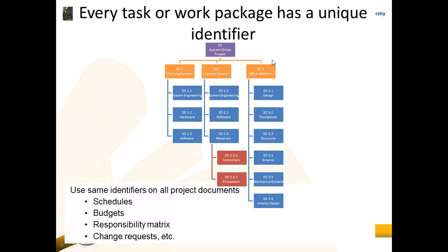So it's important that when you draw up your work breakdown structure, every work package has a unique identifier, and that there is logic in how you add the identifiers.